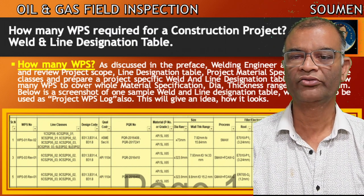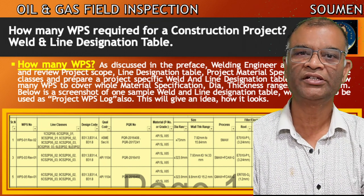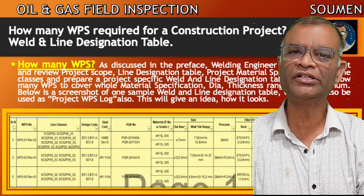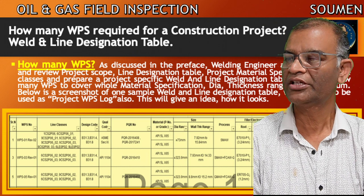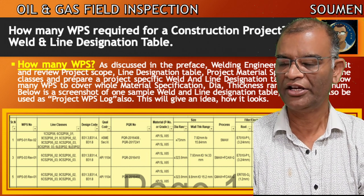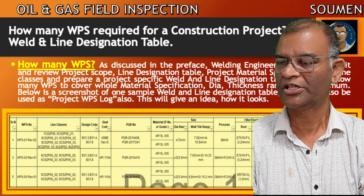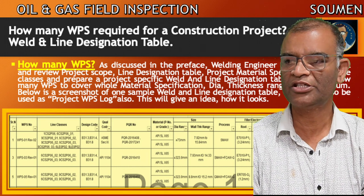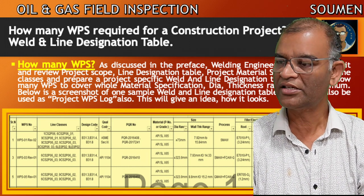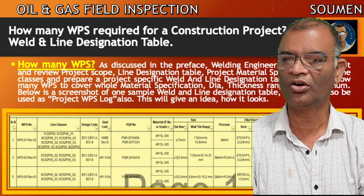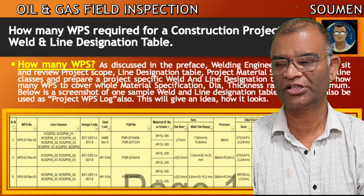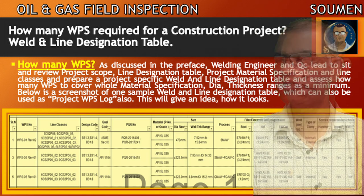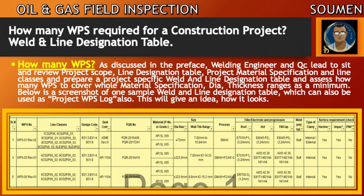Now, another question: for one project, is one WPS enough or will we need multiple WPSs? Who decides and how? The welding engineer and QC lead sit together and review the project scope, line designation table, project material specification and line classes, and prepare a project-specific weld and line designation table. They then assess how many welding procedures are required to cover the whole project material specification, diameter, and thickness ranges to be welded. Below is a screenshot of a sample weld and line designation table.